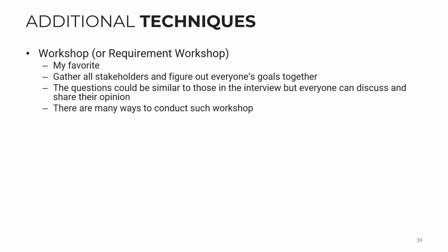All right. So basically, you are conducting a large workshop, maybe 20, 30 people or even more. Okay, you can divide them into groups if you like, and then let them brainstorm. Okay, and come up with a set of requirements or a set of constraints, a set of goals. The questions could be similar to those in the interview, but everyone can discuss and share opinions all at once. All right, you can just ask, what do you do? Okay, when maybe a lot of people in the entire department or even across departments can discuss together.